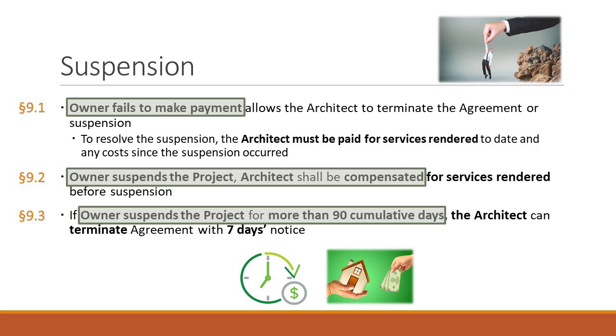That's just so prohibitive against me. I can't let you terminate just because I had to suspend because I had to go get financing. What I will let you do is suspend yourself, and then when you start back up, I'll pay you for your additional costs. So that's what I do as an owner, but 9.3 doesn't have that.